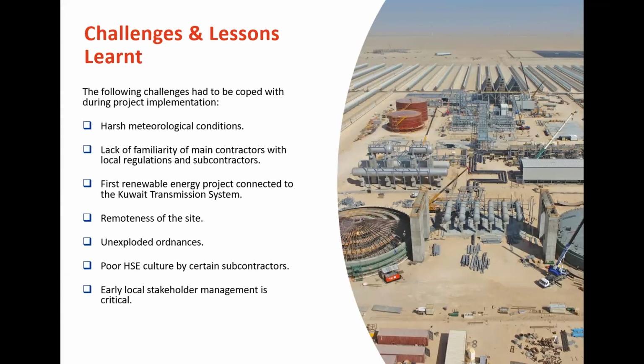And on the other side, this was the first large renewable energy project connected to the grid, at least for CSP and wind. The lack of a connection agreement was one additional challenge that had to be coped with, and that required significant efforts by KISR, as you, Dr. Salem and Dr. Ayman and Dr. Mutasim know very well, to talk and work with the Ministry of Energy and Water and the DBO contractors as well, to make sure that all the approvals could be obtained.